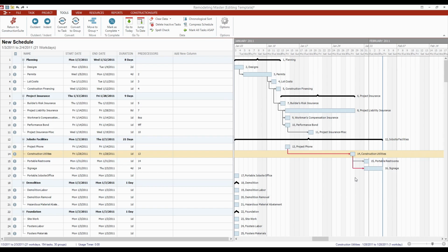The same does not happen, though, if you move this task earlier in the schedule. Those two tasks are still going to be out there at the date that they were set to not too long ago, and this is primarily because as you're setting the schedule, the relationship types that we're looking at are soft predecessors, meaning they're guidelines for an earliest possible start date, but it doesn't force it to start at that earliest possible date.